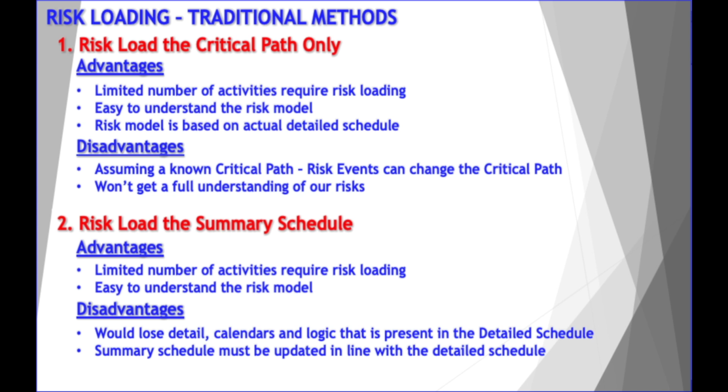Conversely, the disadvantages are we're assuming a known critical path. In reality, risk events can alter a critical path. We won't get a full understanding of our risks.